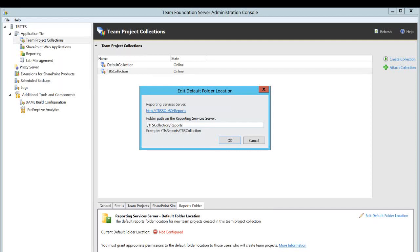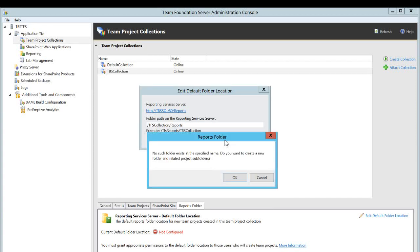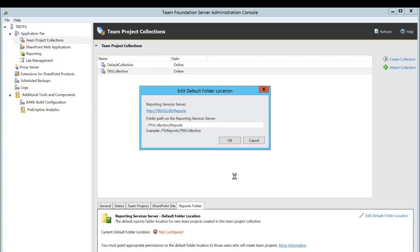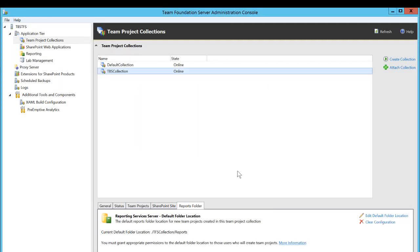This is the folder where all the projects that will be created under this collection, the reports will be saved under that. And if I click OK it says no such folder exists at the specified name. Do you want to create a new folder and related project subfolders? I will say OK, yes, do that. And now it is configured.